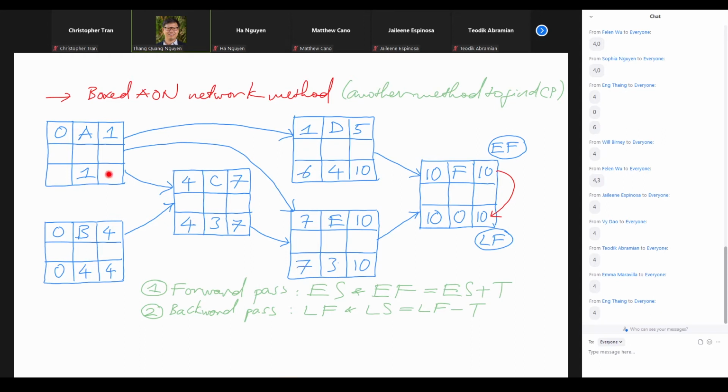If we choose this to be 6 or 7, and it is not the first time when I ask this to any other classes, right? Some people might say 6 or 7. It's okay because we're still learning. But if we put down here 6, then even though that 6 works with that 6, that 6 is in conflict with that 4, right? It will not work.